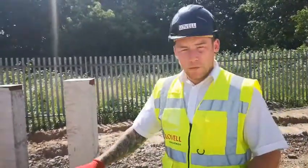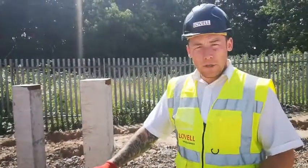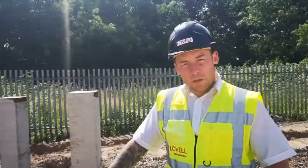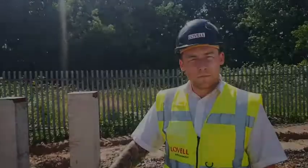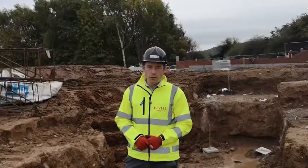The reason being the ground quality on this site is quite poor, so you have to put these in to make sure the house actually stays up. They get hammered into the ground by a big machine as far down as about 14 metres. Once they're into the required length, the ground worker comes along, cuts them down to the ground level, and then we start digging out for the ring beam, what the actual house is built off, which you'll see in the next video.